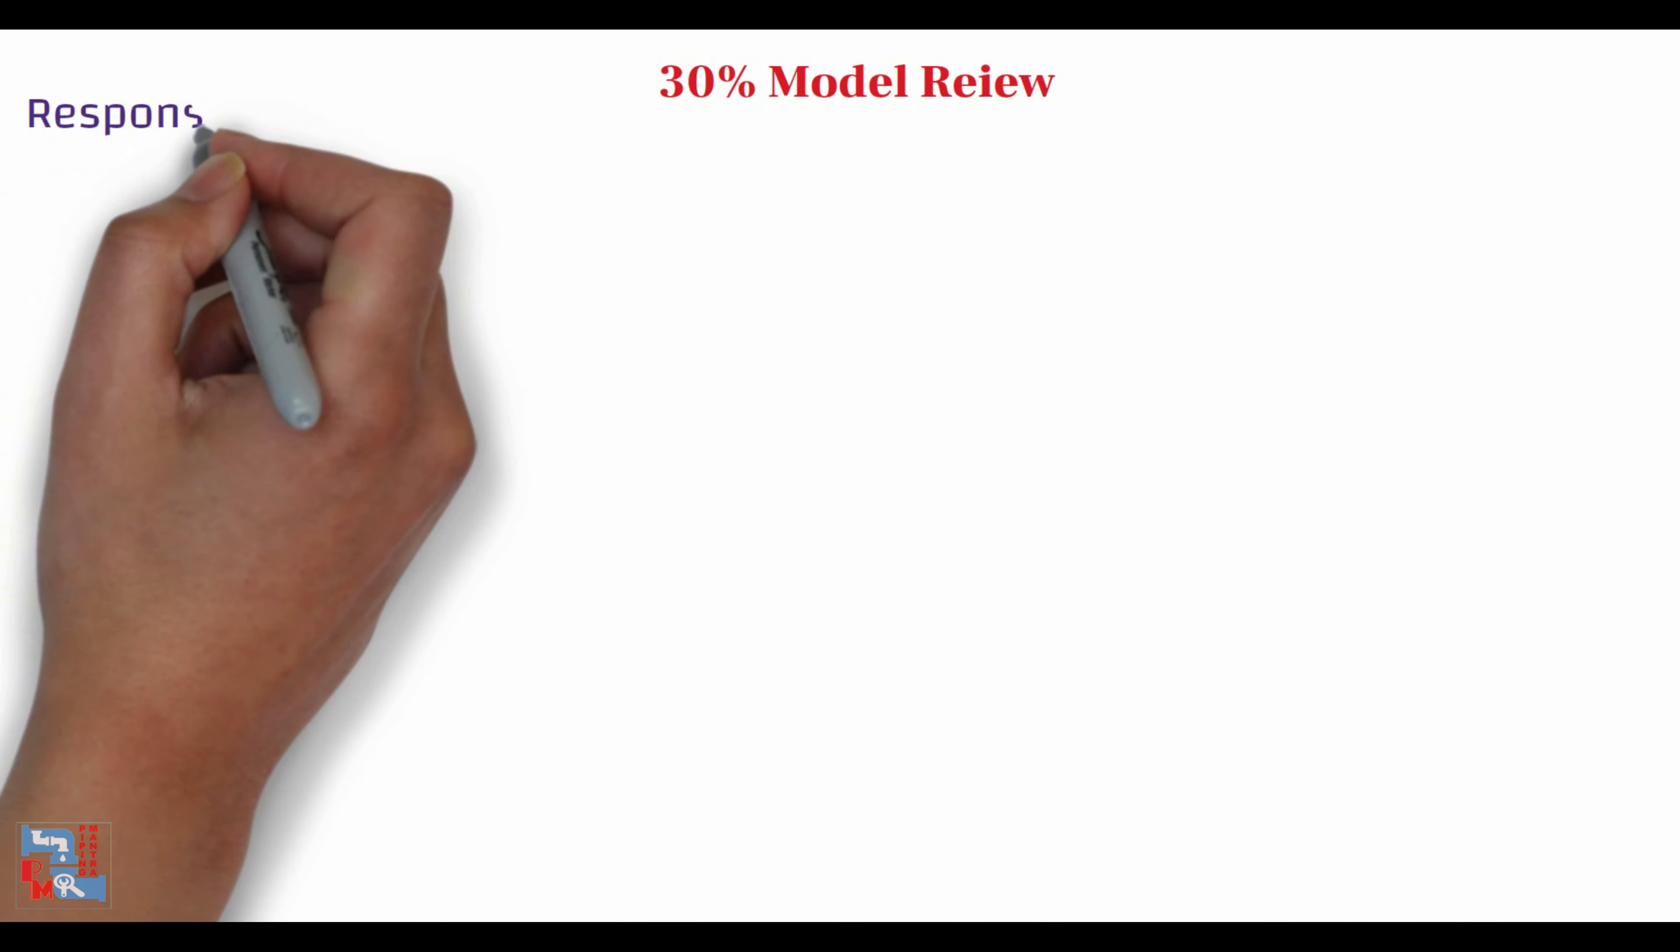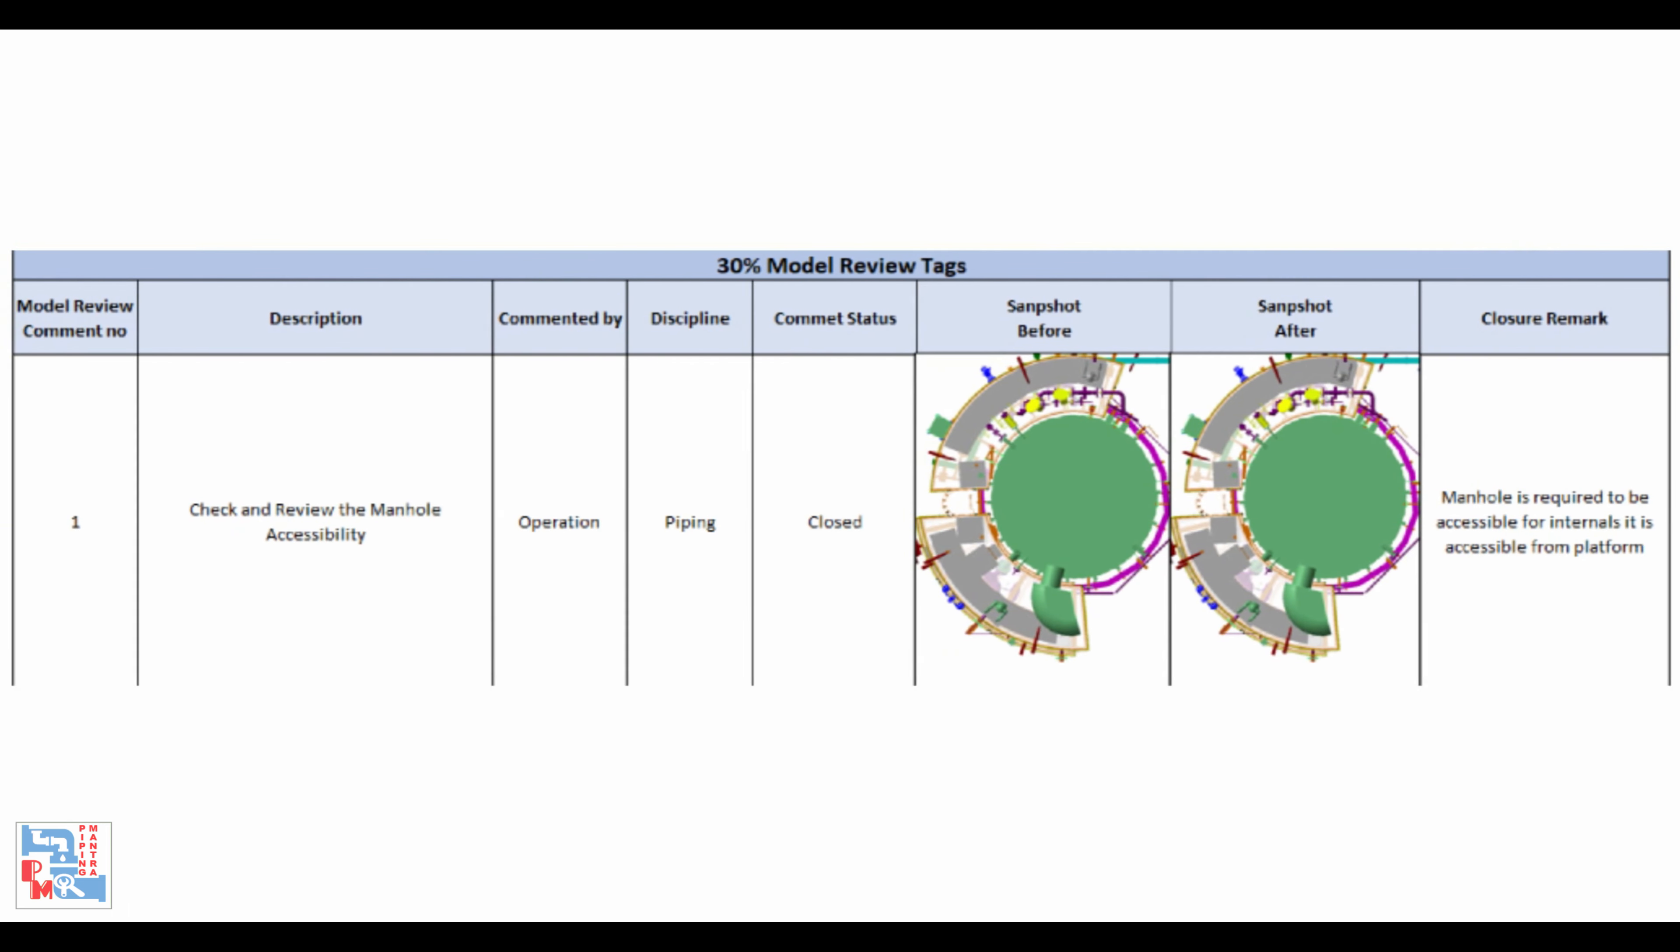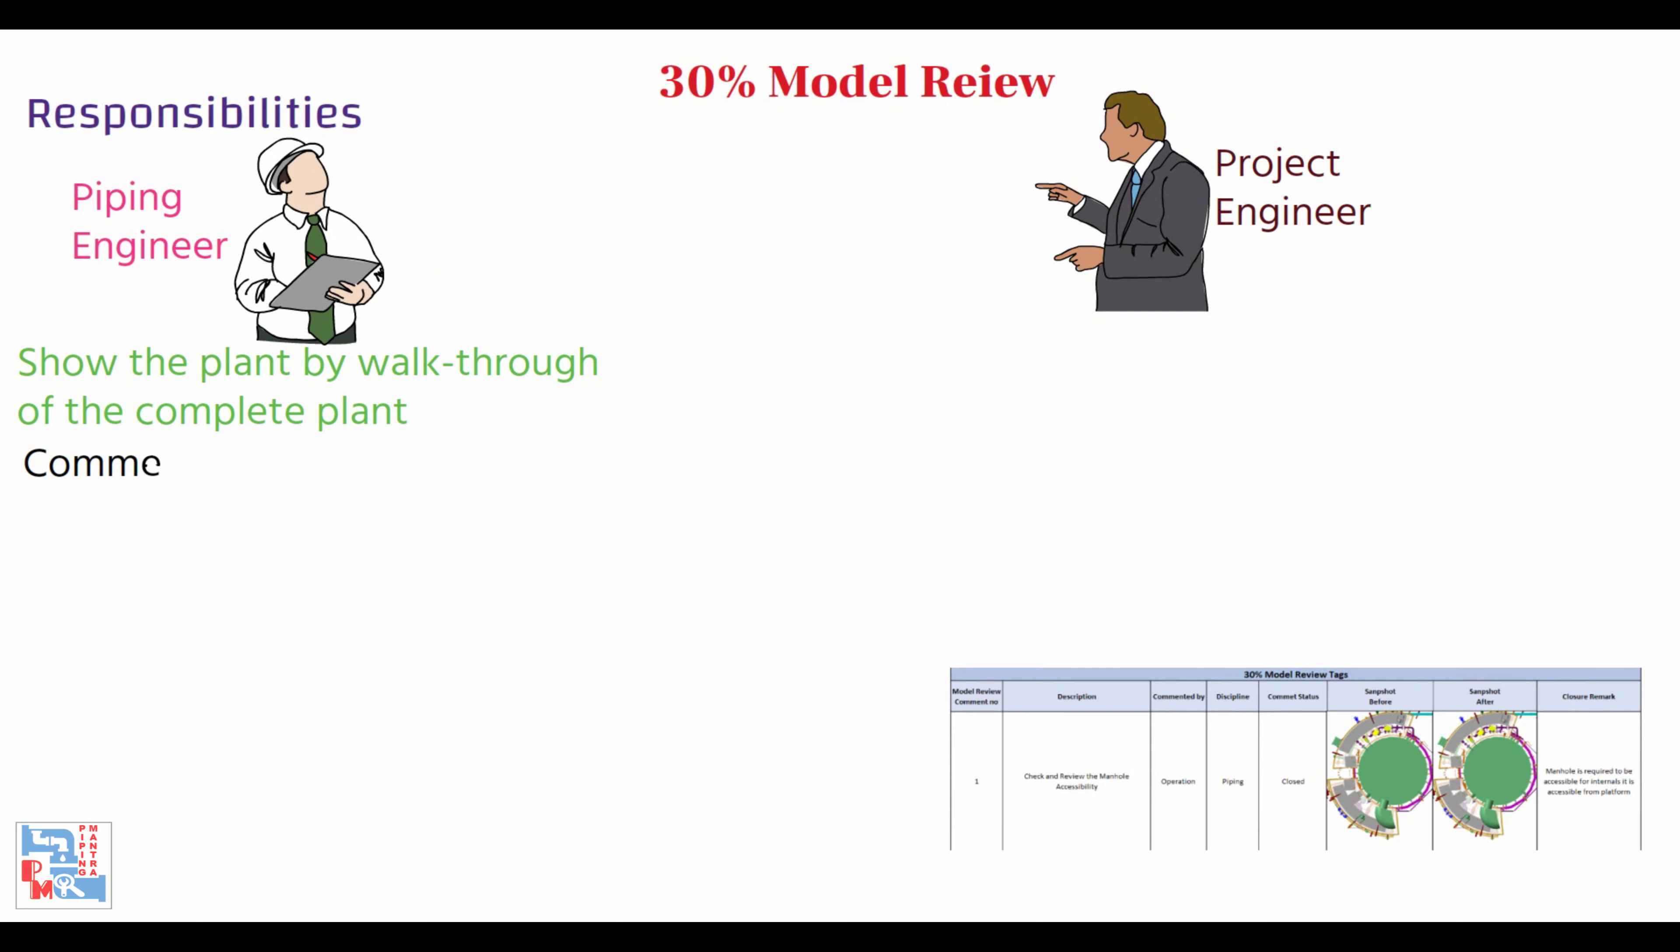Now let's talk about model review responsibilities. The piping engineer and the project engineer are the primary organizers of the model review. The piping lead shows the plant through a walkthrough of the complete plant. All comments are recorded in a proper project format for resolution and incorporation. Any necessary changes and comments are agreed upon and immediately recorded and marked with reference numbers and model pictures to allow follow-up and avoid misunderstanding.